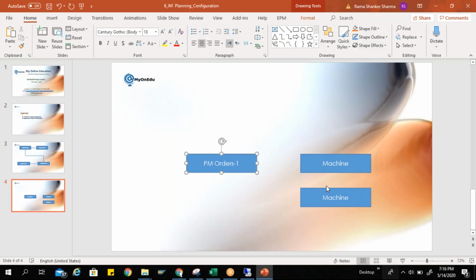Now, yearly, we used to have a plan in the factories or in any plant to go for maintenance. Okay, so that is yearly, and we can manage it through project integration, PS, project integration. So whatever orders we are getting from the PM, we can assign to my activities in the system, here in PS activities. I'm just giving you some overview, please don't consider it's the full cycle.